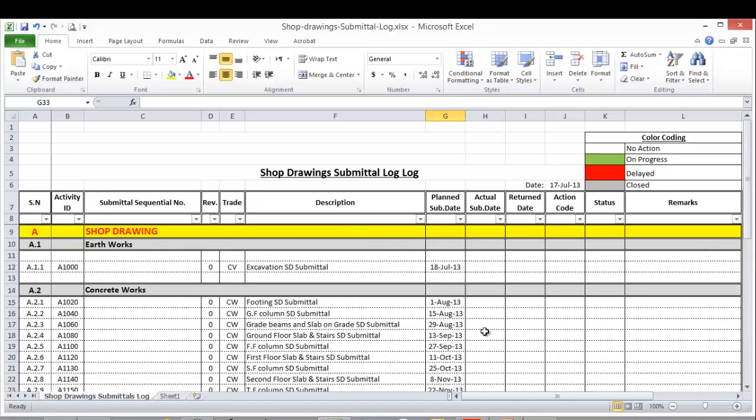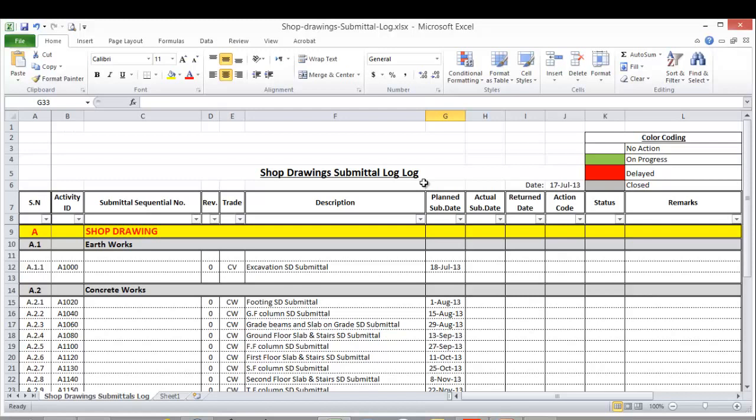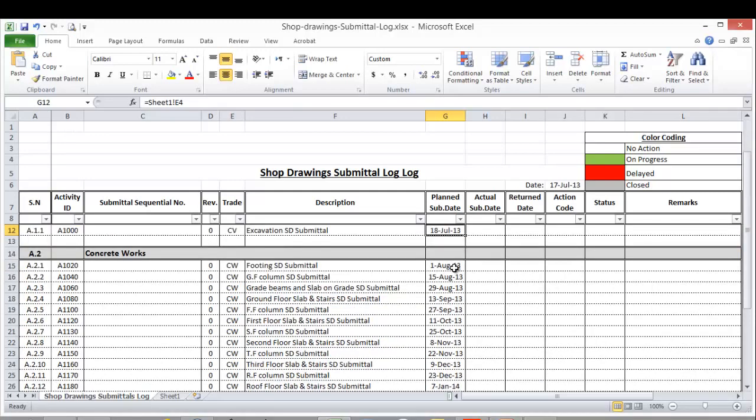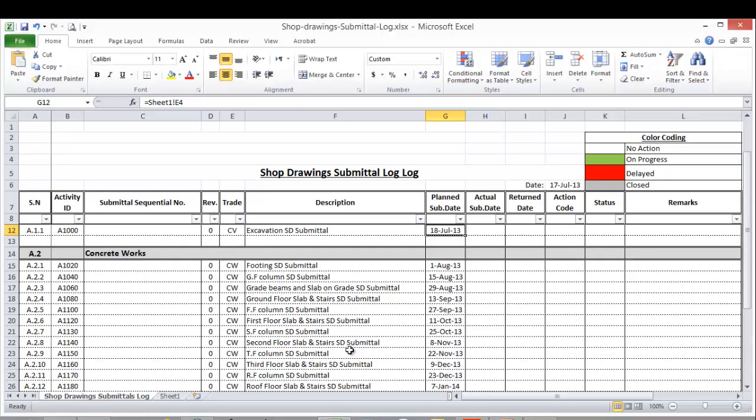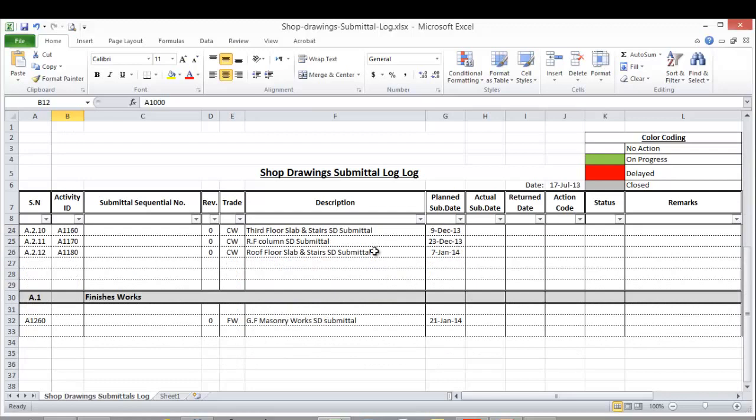And this is a sample of what we can do for the shop drawing submittal log. Usually we are sending this shop drawing submittal log to our technical office in order for them to add more details. The excavation shop drawing could be two or three drawings, so we have here the latest date they should submit the shop drawing. We can add part one, part two, part three and so on. And we give them as well the activity ID so they should refer to this activity ID for all the breakdown they will do.